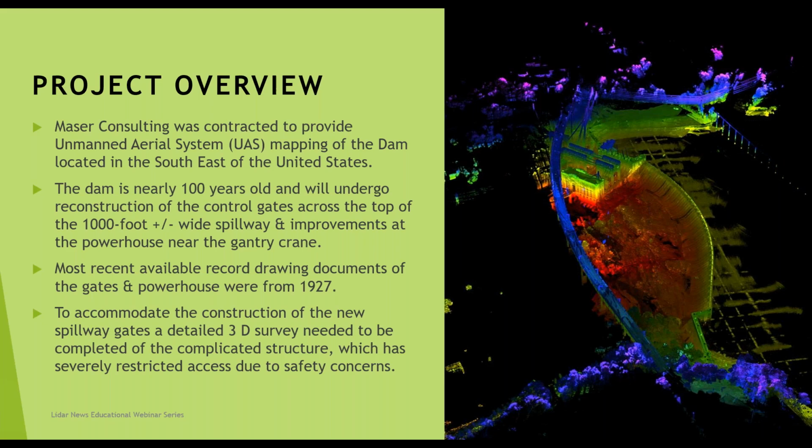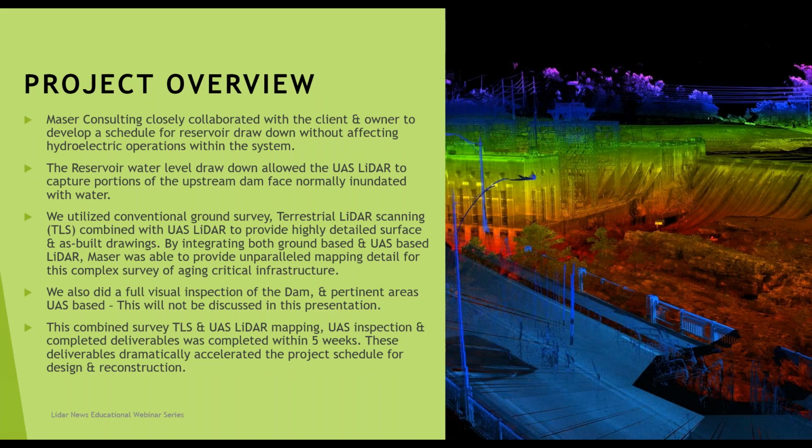So basically, we wanted to work closely with our client and the owner of the dam to develop a schedule for a reservoir drawdown, but we didn't want to affect the hydroelectric operations within the system. Doing that, we were able to identify a 3-day period where we could draw the water level down on a piece of the dam low enough to collect that data, which was also going to be needed during the as-built. The reservoir drawdown allowed us to capture those portions that have not been seen in quite a while.